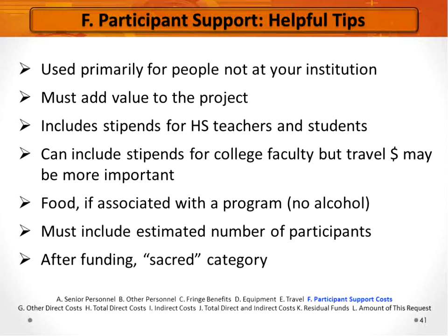Be sure you do put in that estimated number of participants because it really does look funny when you have $30,000 of participant support and you're actually supporting 0 participants. So that's definitely something to think about. Every once in a while, people will do developing a curriculum module, and one of the things they'll use is some of the materials and supplies and other so that they can send the faculty or teachers back with enough materials to at least implement what they've learned at least one time. That might be something you want to consider.